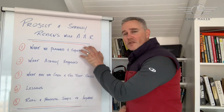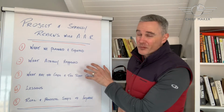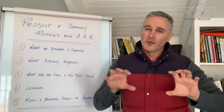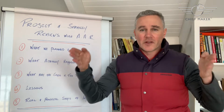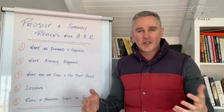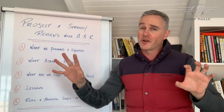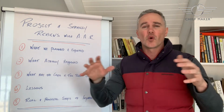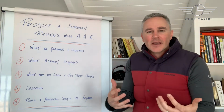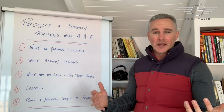They said they'll do a set of things. What actually happened was only about half of those things got done, and only pretty poorly. The gaps were in their project planning process. They did too many projects, and they planned those projects in isolation of each other. So when we turned up, we could see that the resources planned in this project were also being allocated to this project. They just had no idea. Happens all the time in business because we all do so much. We're so eager to make change. But if we get together and do that project planning together, life's a little bit easier.